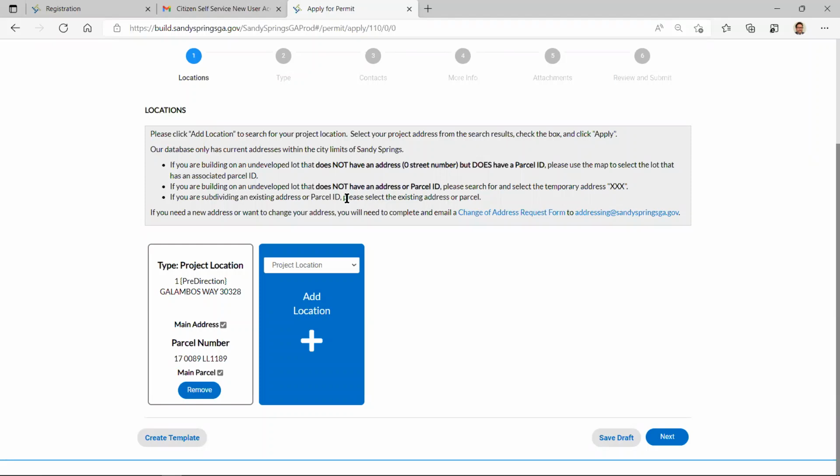The addressing is handled by a team, a subgroup comprised of planning and zoning, somebody of an architect, and also the fire department. And it's critical. You can't necessarily pick the address you want. There is a sequence, a rhyme and reason for why the addresses are what they are. That's for emergency response.